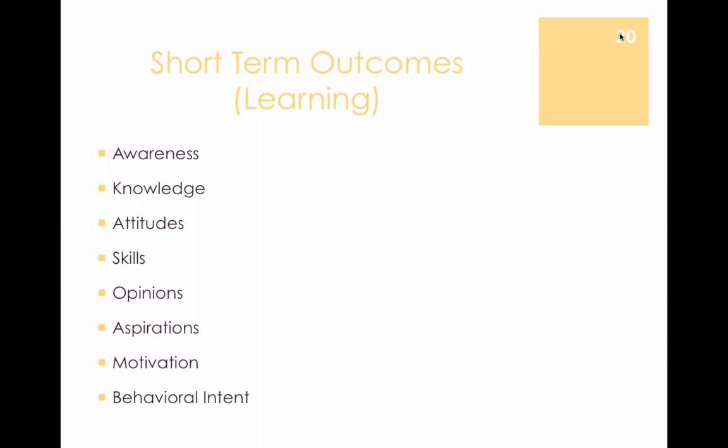And we're talking about outcomes. Again, these are the changes or the benefits that occur as a result of your program. And you need to highlight these. And these are reflected in three ways, well, actually four ways, and sometimes generally three within a logic model. There's the short term, the medium, the long, and the impact. Short term are changes in learning, medium are changes in actions or behaviors, and long term are a change in the conditions. And if they ask for an impact, it's a change in the system.